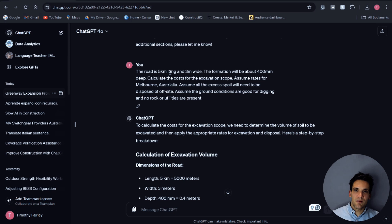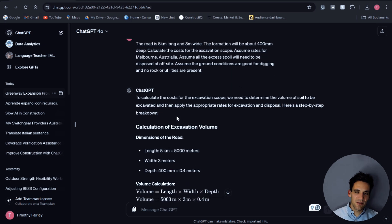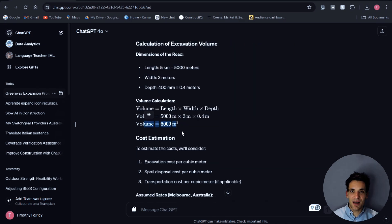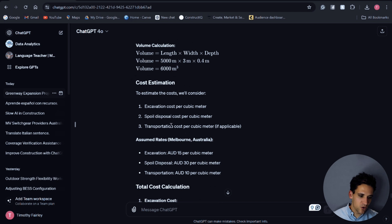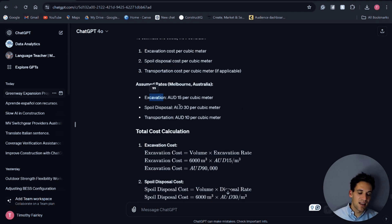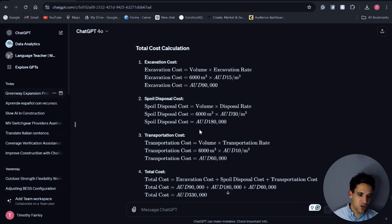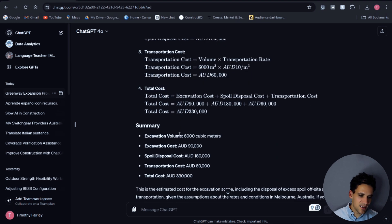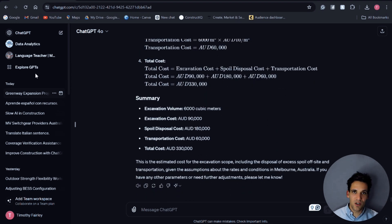I've told ChatGPT the road is five kilometers long, three meters wide, and the formation is 400 millimeters deep. Based on this information, and assuming the project is based in Melbourne, Australia — which is important for calculating rates — I've asked it to calculate the cost. It's determined the volume of works, determined what activities are required to estimate the excavation, and applied reasonable resource rates: $15 per cubic meter for excavation, $30 for soil disposal, factored in transportation costs, and come up with a direct cost of $330,000.